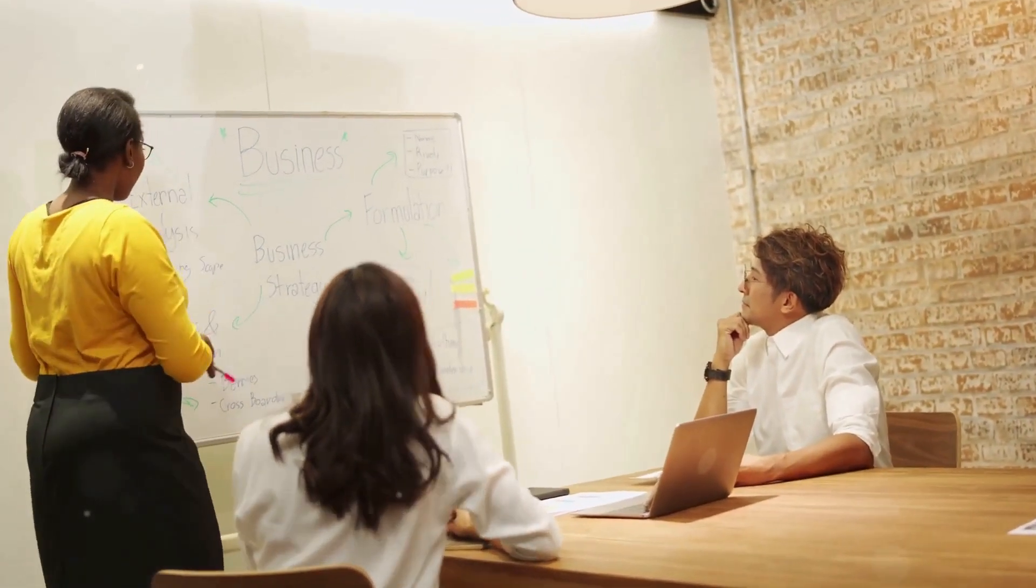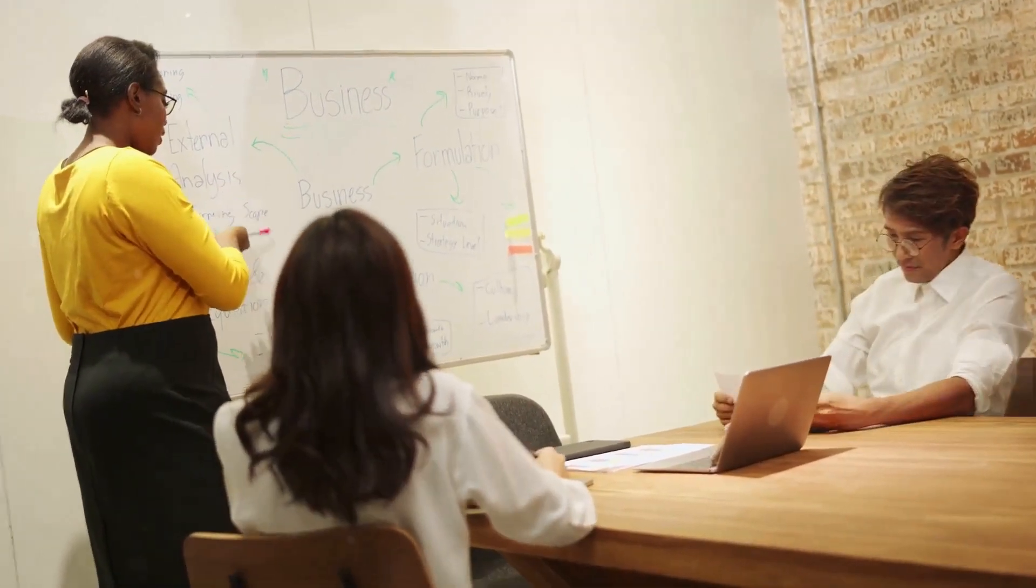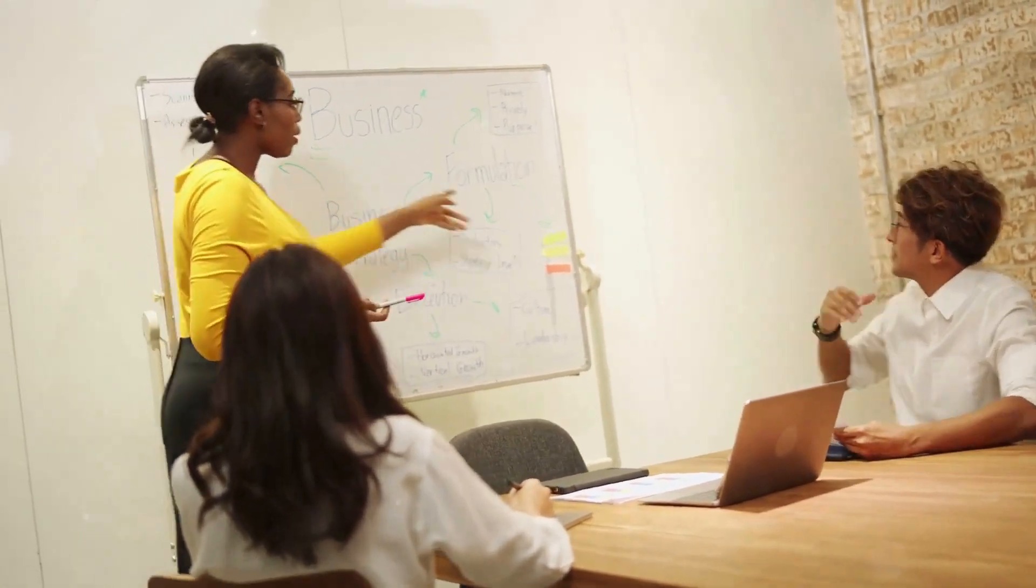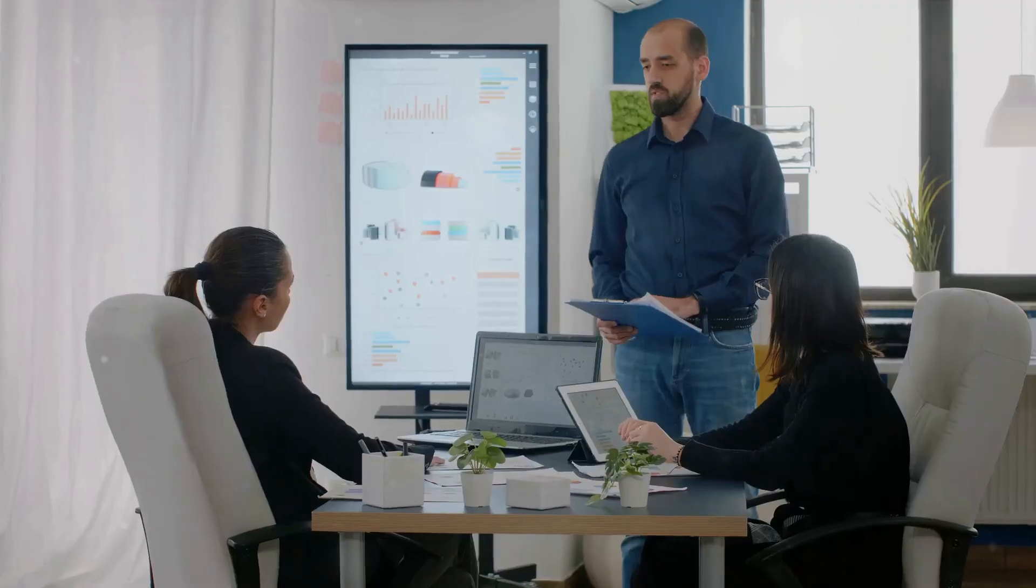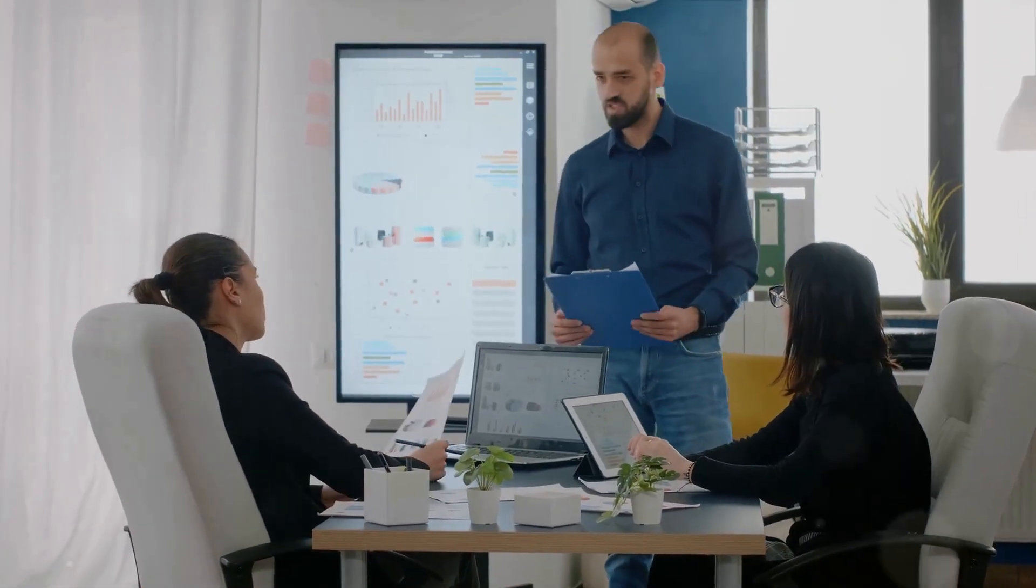A daily stand-up, true to its name, is a brief meeting that typically lasts for about 15 minutes. Team members usually stand to keep the meeting short and focused, hence the name stand-up. During this meeting, each team member answers three key questions.